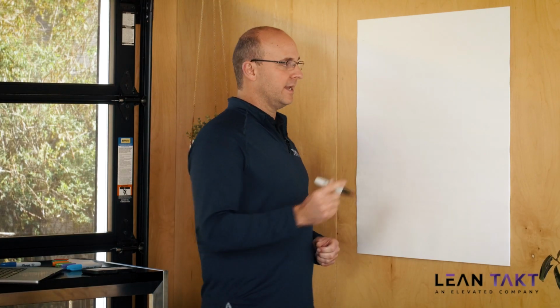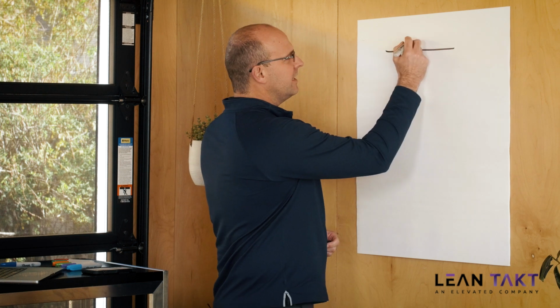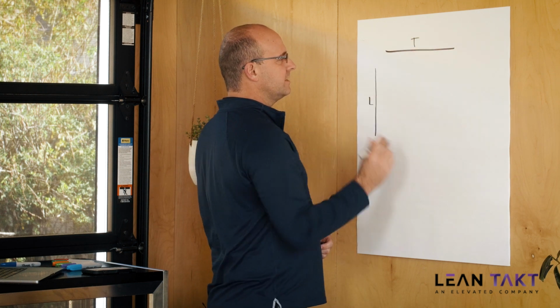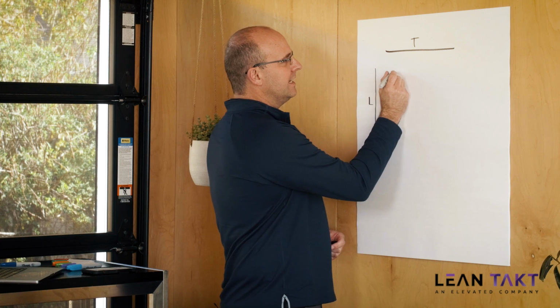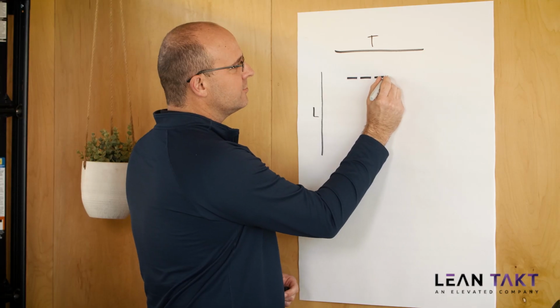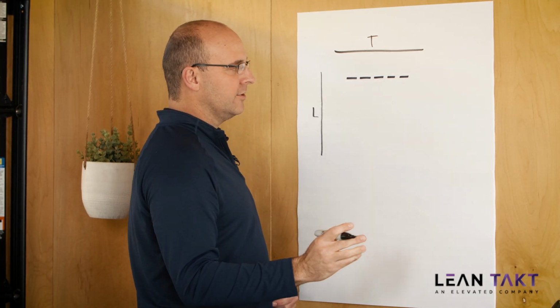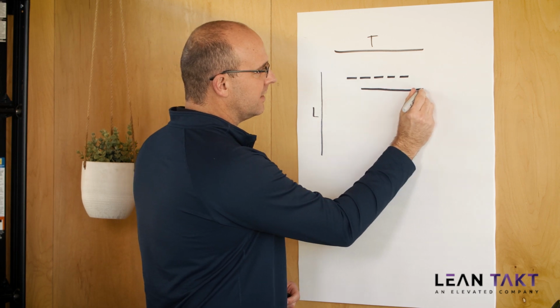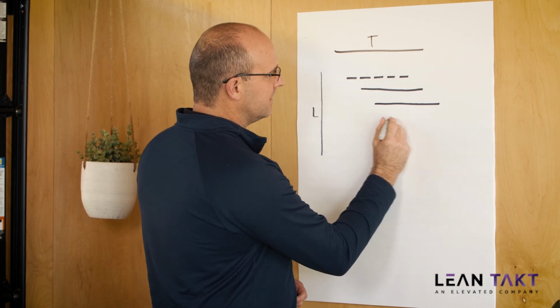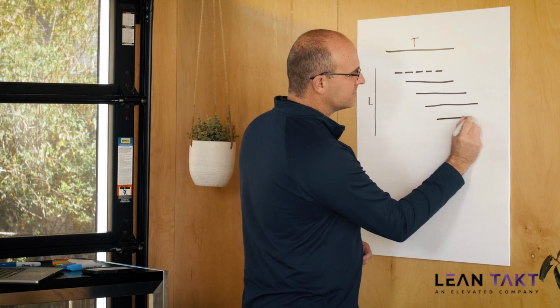So in takt planning, I love the idea that we identify our point of no return, either with colored cells, in the software, with line work, or with just data or a date. And it really runs off of a pace. So let's say you have your time by location takt plan, and instead of drawing the individual wagons like I typically do, I don't want to waste your time. I'm just going to draw a straight line which communicates the wagons in that zone, in that sequence specifically.